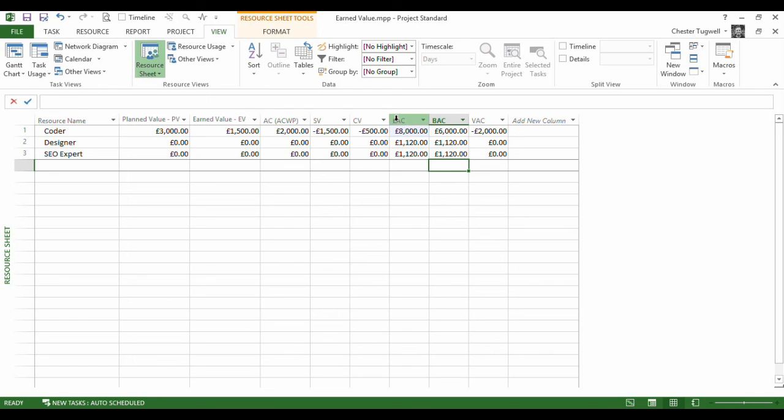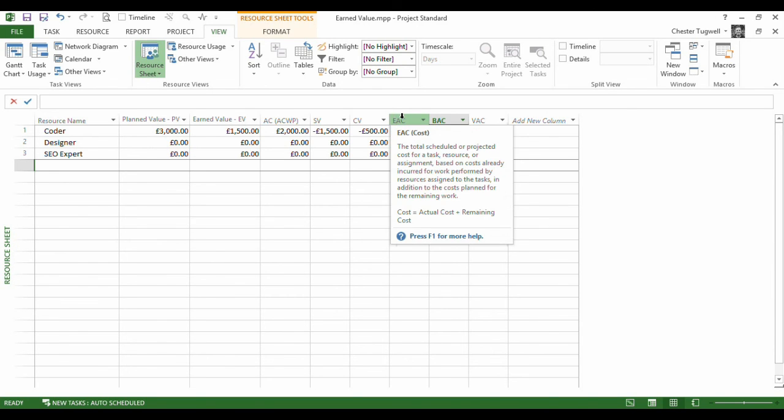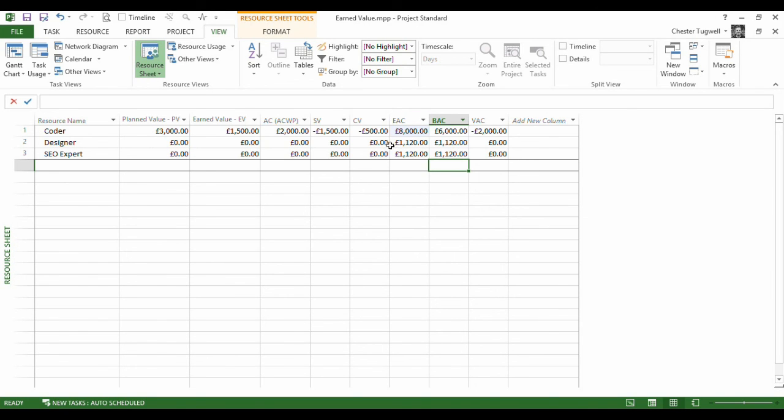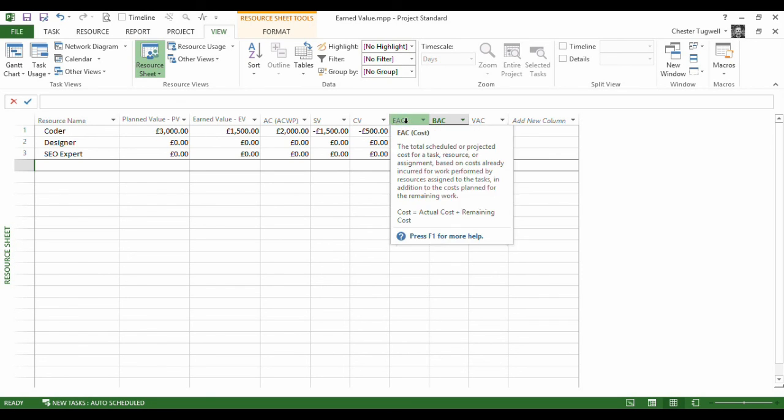Now let's just look at this figure here - estimated at completion. This frightening figure here tells me that I'm actually going to spend £8,000 based on the overspend so far on my project.